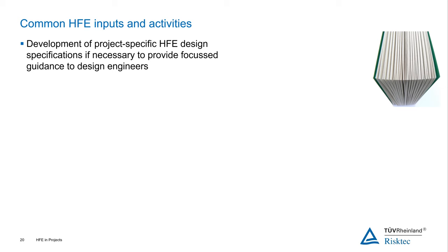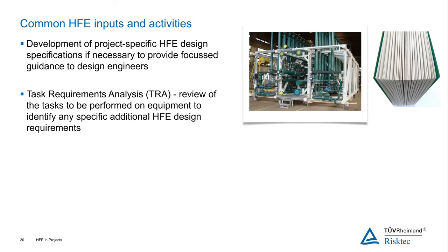Similarly, for particular things like you see here, this skid package for an offshore facility, this sort of equipment here, we may carry out a task requirements analysis on that sort of package. What that would be is to have a look at that, understand the tasks that have to be carried out on that piece of equipment, and actually identify, are there any specific additional HFE design requirements that we need to set? So you might say, well, actually, hey, we need to give more space in this area so we can access this valve. So it might pull out some more requirements that may not have been pulled out early in the project.